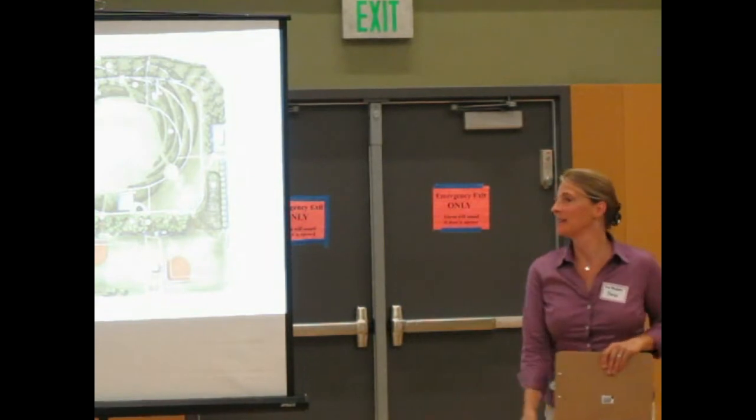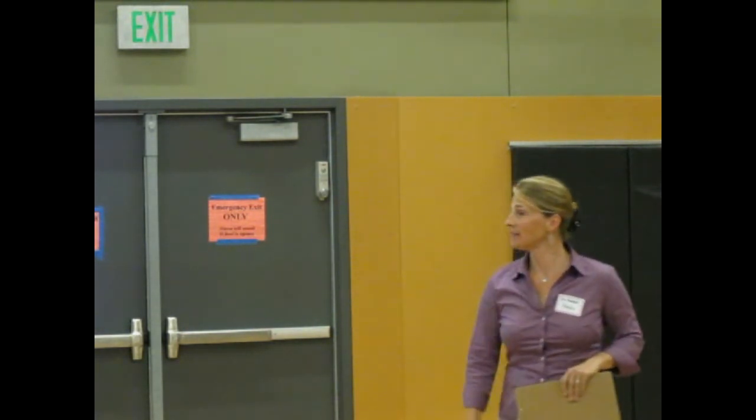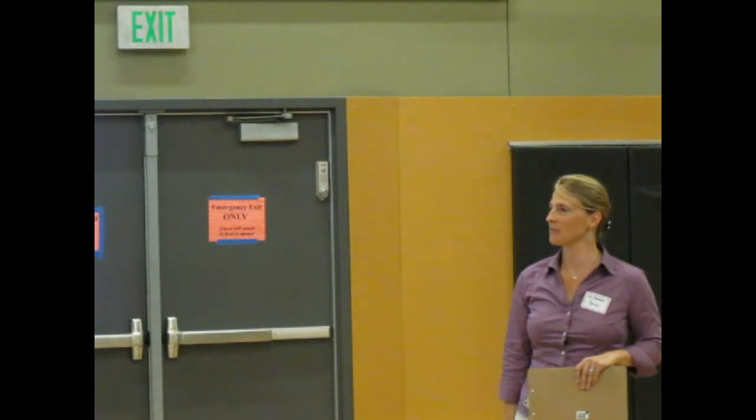So as soon as we have a schematic design for the play area on Canopy Terrace, then we'll move into construction documents and everything for the entire site. And so that's exciting. We're on that path right now. And with that, I would like to introduce Greg Brower. Here, come on up. One quick question. I forgot to answer this question, but it's going to be bid as one project, the entire thing? Yes.